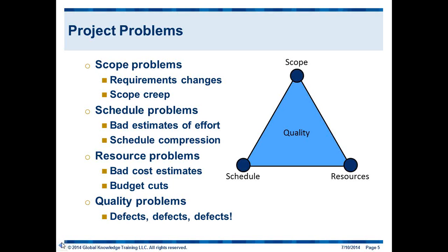Last but not least, again, in my experience on waterfall projects, the people who deliver last, the people who have the last phase of the project, are the people that get squeezed. Design runs late, which causes development to run late. Development runs late, but we still have to make our date. So who gets squeezed? The QA people. And what ends up happening is we have a choice to make. It's a hard choice to make. Either we move the date or we go in dirty. Our solution has a lot of defects.